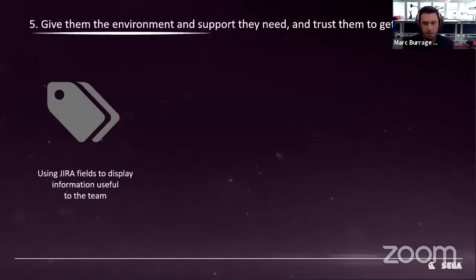So there are tons and tons of Jira fields, and you can turn everything under the sun on, but start having a look at it and seeing what fields are actually being used, start having a look and seeing what reports people are pulling out of it, and strip it down as much as you can, so that especially when people are entering tickets, when people are having to do anything with those tickets, choose the field types carefully, just make it something that is as frictionless as possible, so that you're getting what you need out of it reporting wise, but more importantly, the team are getting what they need out of it in terms of having information about what they need to work on, what it's linked to, when it's due.